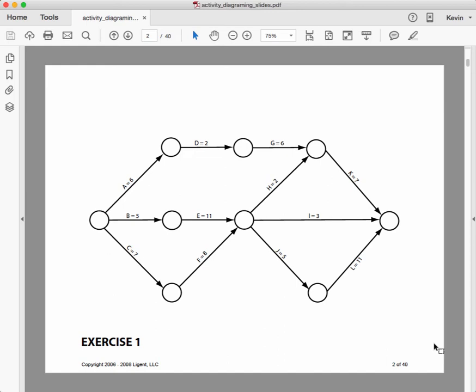And then as we go down across the diagram, the nodes that we introduce just really show the dependencies. So between tasks A and D, we have a node that indicates we have to finish task A before we can start task D. Some of the nodes have more than one task arrow feeding into them.